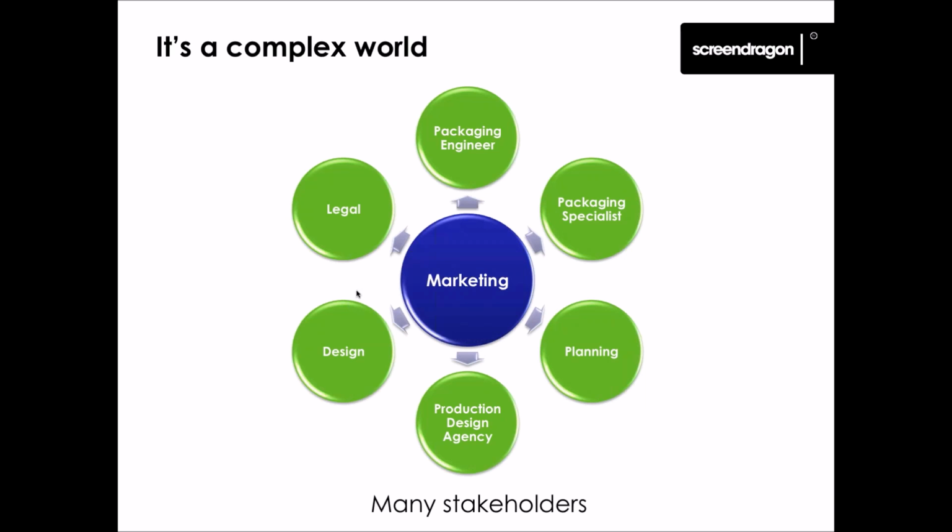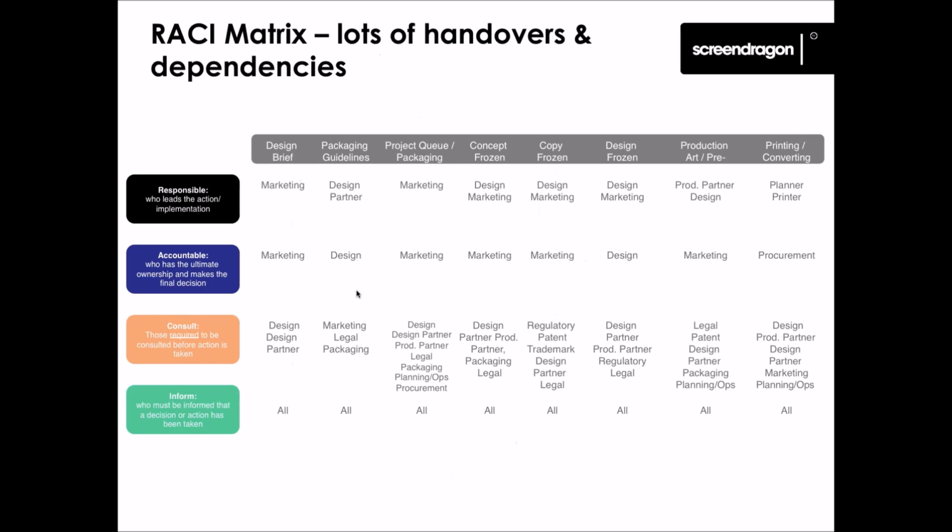And with each of these stakeholders comes different responsibilities. So add another layer of, I'll talk positively, sophistication on top rather than complexity. And you're building up sort of RACI models of who should do what, who should take a decision, but who's informed. And that's tricky. First of all, you've got to work it out as a process, and then you've got to implement it whereby people can follow it and follow it easily.